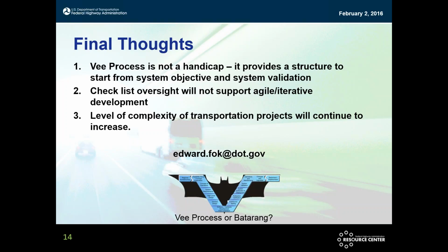And what we end up doing during the course of the project is we will use a trade-off guide. We run into a problem with this. We've got limited time and resources available to fix this problem. If we drop this, how is it going to impact things? If it's a low priority item, turn it loose, go back and focus on the high priority item. Then you can have a roadmap on what you need to trim to get back on track.